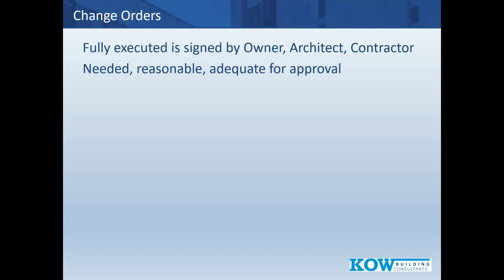Number two, is it reasonable? Meaning now that we know we have to do it, is it reasonable in their approach to what they want to do, how long it's going to take, and what it's going to cost? And this consultant like us said, yeah, it was reasonable. We looked at the time and materials. It was reasonable. I said, then to me, that's adequate for approval. Now, who's to blame? That's a different conversation.